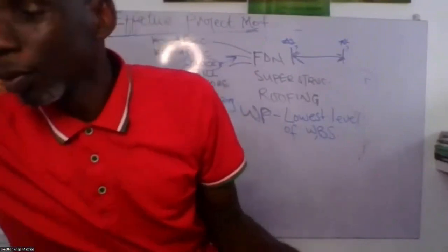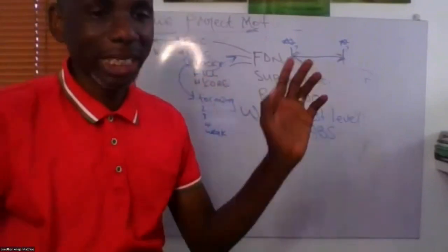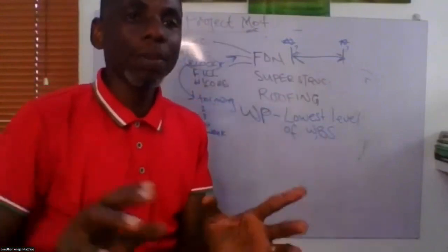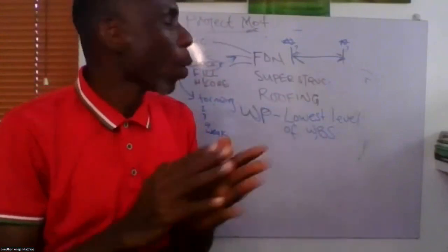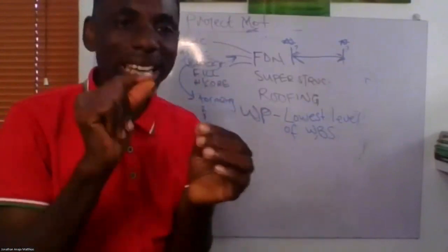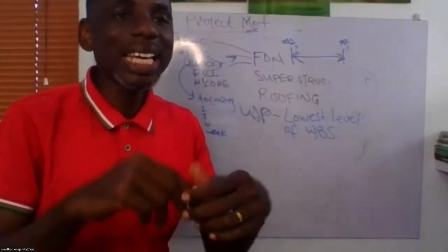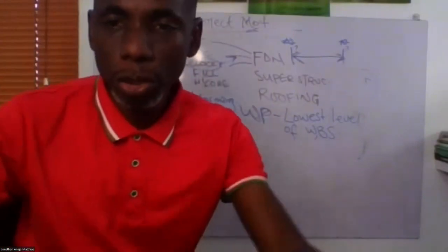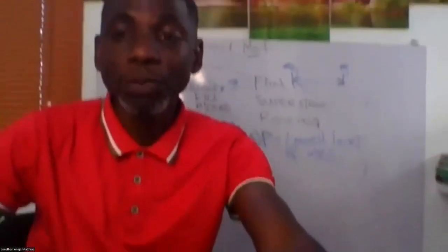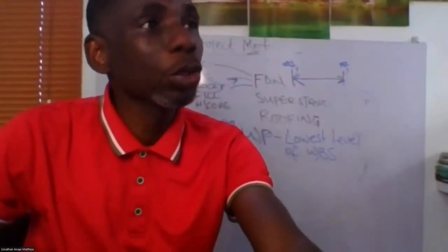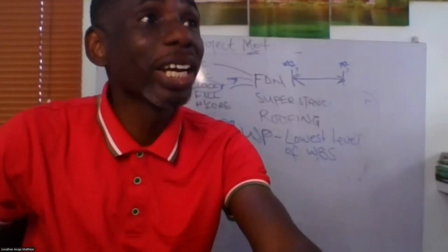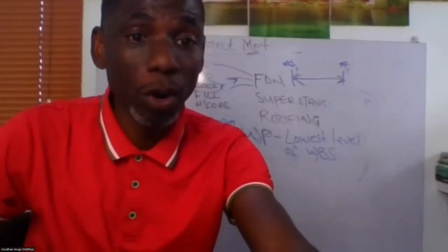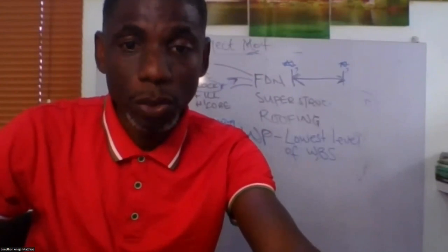So that's just why I mentioned that. I didn't mention this yesterday, so I thought it was important for me to emphasize, because it was in yesterday's class, that a WBS is a way to break down your work, while a work package is the lowest level you need to get to so that you can easily assign time and assign money to your WBS. As a matter of fact, if you have not decomposed your work into subtasks, it's a bit difficult for you to begin to estimate.